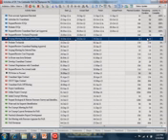Once I have all of the actual dates in, I move the data date to that December 15th date and then reschedule the project from there. So you're right in that I am putting it in the future to begin with, but understanding that I'm keeping the new data date in mind when I'm actually statusing the schedule. I know it's sort of an abstract concept.